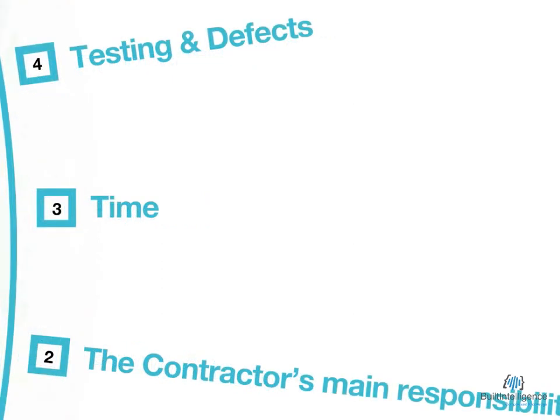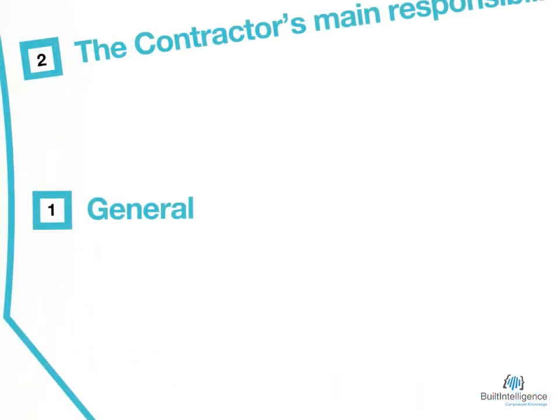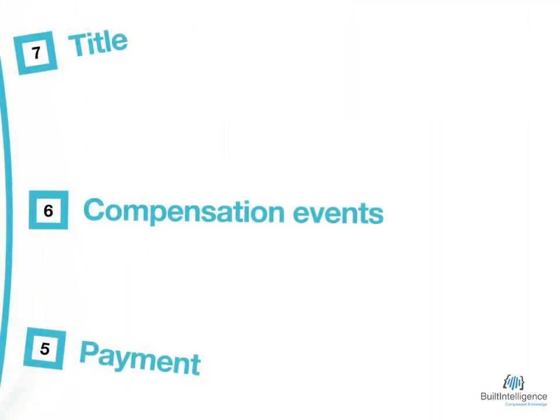Section 3 covers the contractor's obligations in terms of time to do the work and programming requirements. Within Section 1 are the early warning and risk reduction processes, and Section 6 covers the definitions of compensation events, the process for their notification, submission and acceptance, and the criteria by which they are evaluated. More on this when we discuss the stimulus to good project management objective.